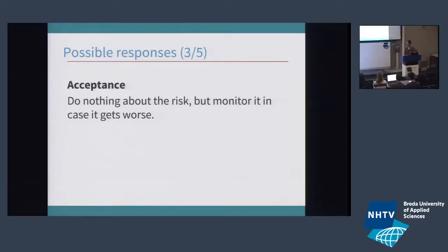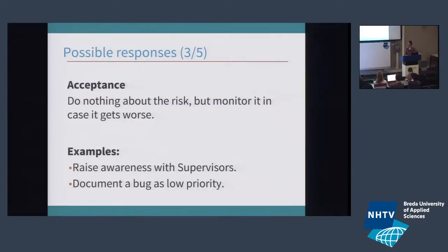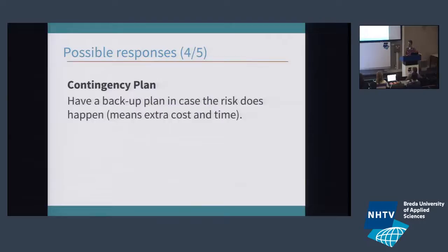You could accept it — you kind of ignore it. Often if the risk is bad enough, you don't totally ignore it; you keep an eye on it every week. Sometimes you can't prevent it; there's nothing you can do, so you just go on. In terms of a producer, you need to inform your client and upper management, make sure you have some kind of monitor in place — put a bug as a low priority in the bug database so it pops up at triage, but you don't really do anything about it. Contingency plan: sometimes you set up a backup plan.